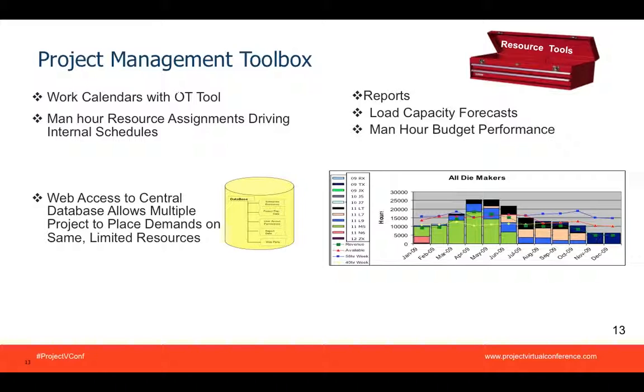Literally almost all the companies in automotive today, especially tier 1s and tier 2s, forecast or attempt to forecast their resource capacity. So what does this chart represent? The bars are resource demand. The resource demands are those demands required to meet the schedule. The line chart shows the capacities of the resources using alternative overtime work schedules. So you may have a 40-hour line and a 50-hour line and a 66-hour line with different amounts of capacity based on the amount of overtime planned to work.